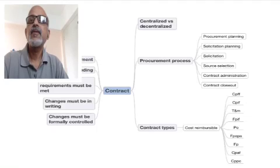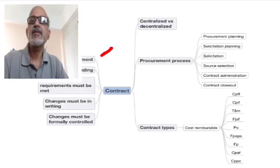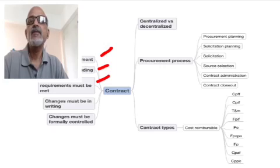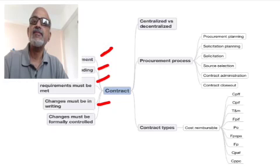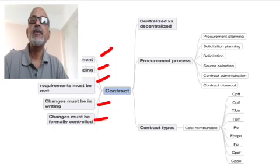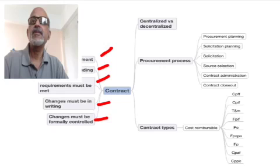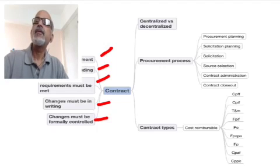All contracts are a formal agreement between the customer and the supplier. They are legally binding, and all contract requirements must be met — otherwise the other party can sue you. Changes must be in writing and formally controlled. You cannot have amendments to the contract by way of emails. Once the contract is signed, it should fall under a change management procedure, so it cannot be very ad hoc.